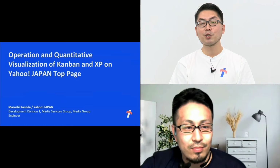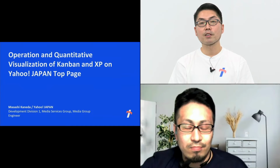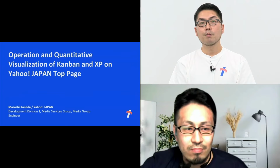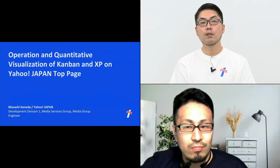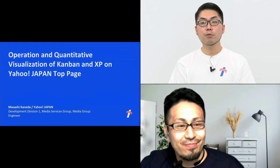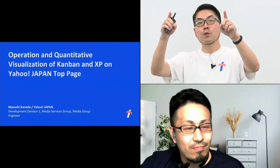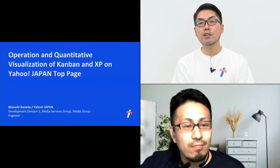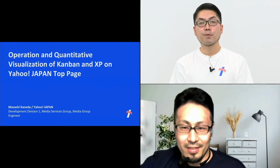Well, those inserted projects, yes, we assume that to happen. We have a lot. So within that flow, we make it so that anyone can change the priority every day. And every day a judgment is made. If we decide that we have to do this quickly, we identify that in the morning meeting and then insert it. And sometimes the development work that had been done will be suspended for a while. And as for proposals from the development side, it might seem that the planners worked on all the plans, but in fact, engineers are included in the planning team. So engineers can, of course, come up with proposals. Thank you.